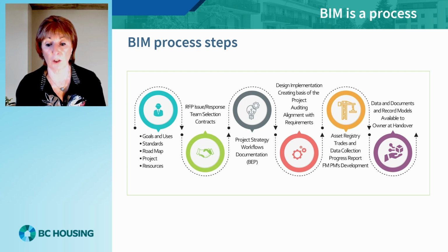Update of the design model to reflect changes that occur during construction is a vital piece to ensure that the dataset provided to the owner contains not only accurate geometric information, but also accurate locational information and installed asset information. Fabrication models contain very accurate complex geometry, way more than required by facilities, but do not typically contain any design intent information.